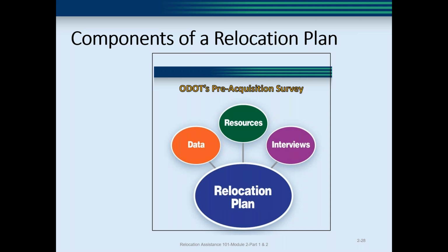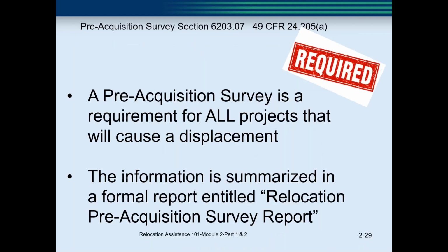So the information obtained during the pre-acquisition survey is much more detailed and accurate than the conceptual study, and it is included in the final relocation plan. So when do you need a pre-acquisition survey interview and a pre-acquisition survey report? You need it anytime you have a displacement on a project.